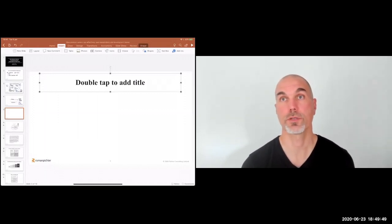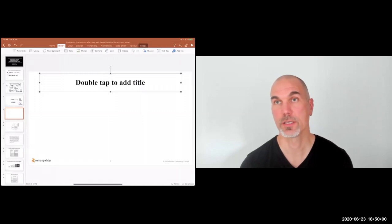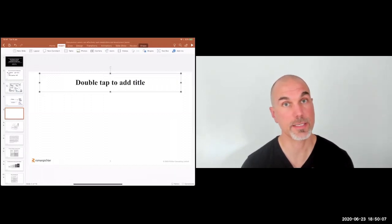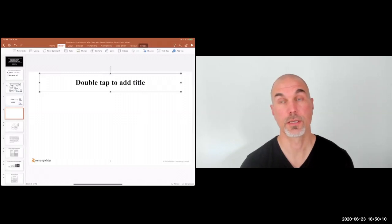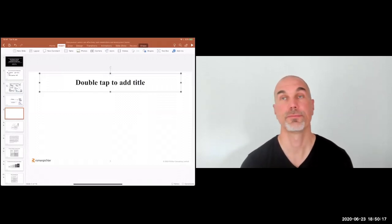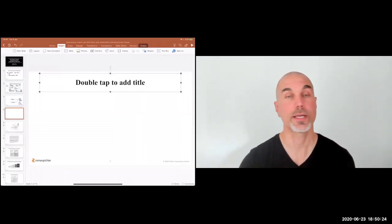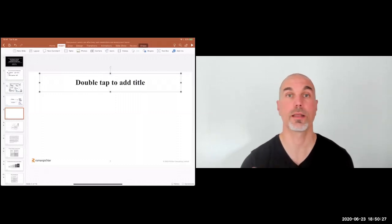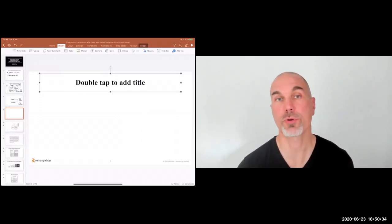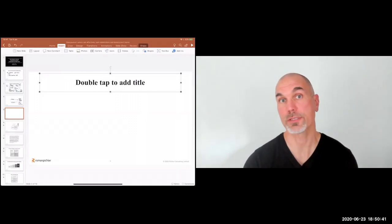The point of the sprint review is not to habitually run a product demo just because the Scrum framework says so. Scrum is kept intentionally simple. The main reason Scrum suggests a product demo is because it always works — you can do a product demo after the first sprint with very little functionality created, tell a story about how it will be used, and stakeholders can relate to it and offer initial feedback. But it doesn't mean a demo is the best technique to validate the product decisions that were taken.